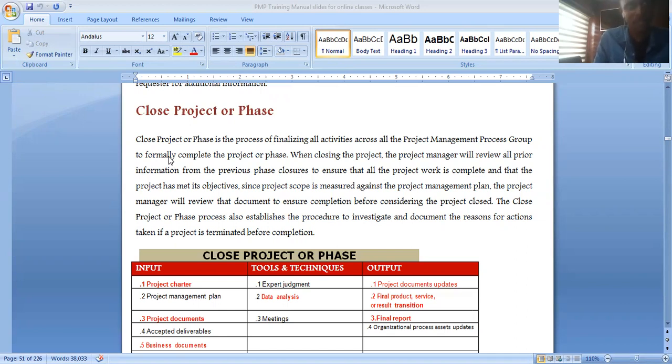Milestone. Okay, but for construction projects, phases sometimes are not about time. And sorry, milestones are not about time. Phases could be by time, could be by activities. Milestone may be like foundation, for example, because of payment, set targets for payments and certain difficulties within the project area. Not only for payments.